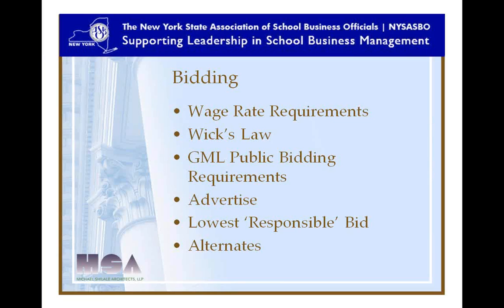The bidding phase is always an interesting time. As you know, in New York State here we have the Wicks law, which requires us to bid out any projects over a certain size to multiple primes. We have obviously prevailing wage rate requirements. When I was Vice President of Government Advocacy at the American Institute of Architects here in New York State, one of our challenges was to get the state to repeal or to reform the Wicks law, which a few years ago we were successful. We did get some Wicks law relief, which in Rockland County, which is where I'm from, and some of the surrounding counties, it really didn't help us.